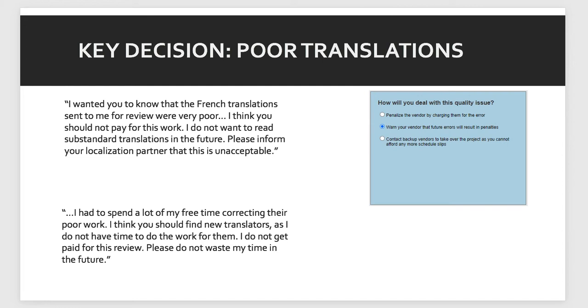What happens when you're faced with a quality issue? The last decision presented in this case, the localization for the French-German poorly prepared translation. The problem was detected by a quality check by the local office in Germany and France, which is typically a small amount of work in off hours, and verified quality turned into hours of work for these offices. When confronted, the vendor acknowledged, apologized, and stated they had some inexperienced personnel working on the project and that the problem would be corrected free of charge. The error did not incur any additional costs, which is good, or any slippages on the baseline, which is good.